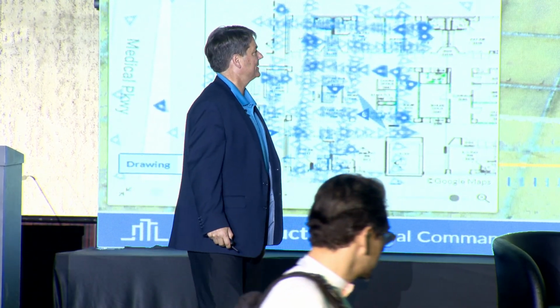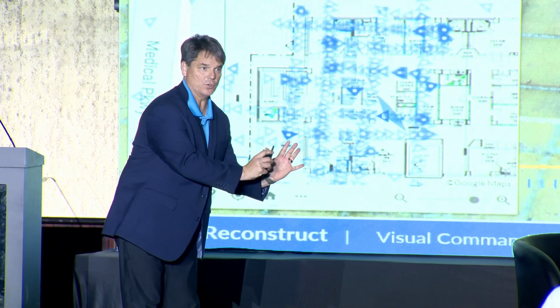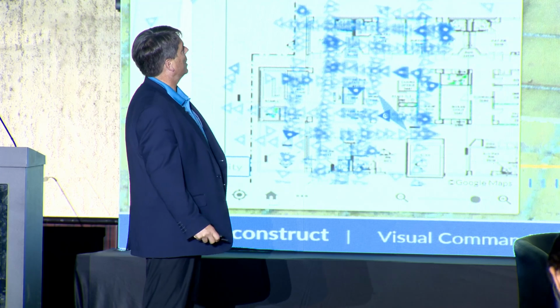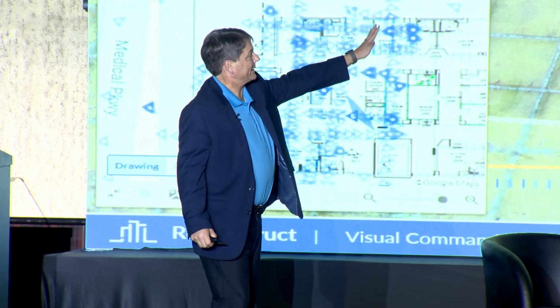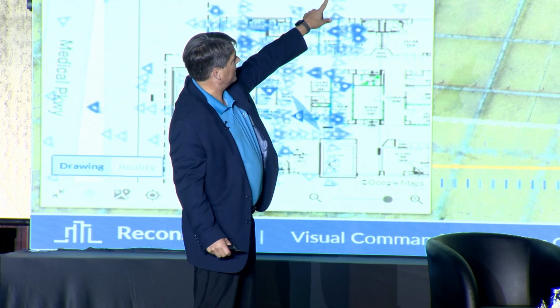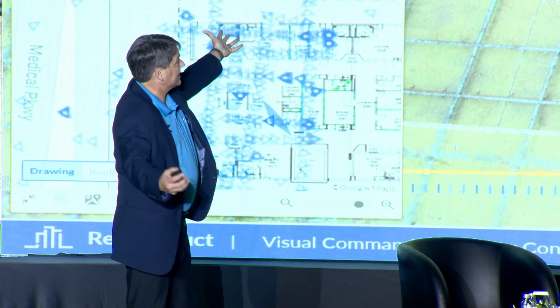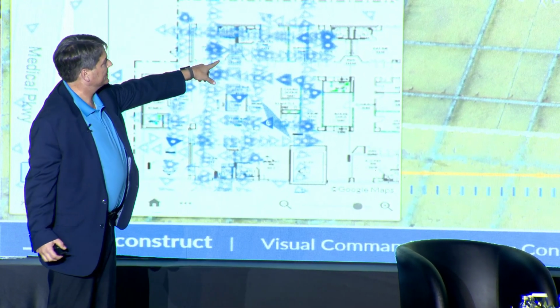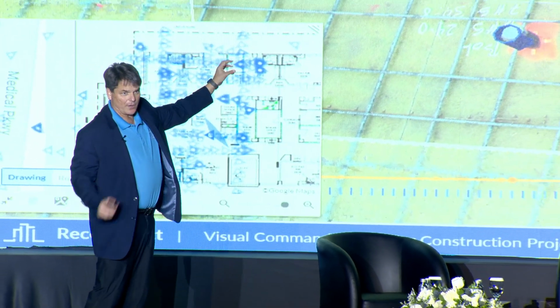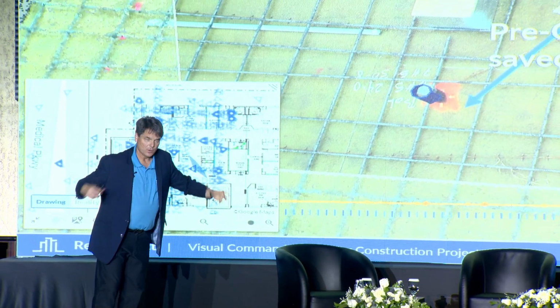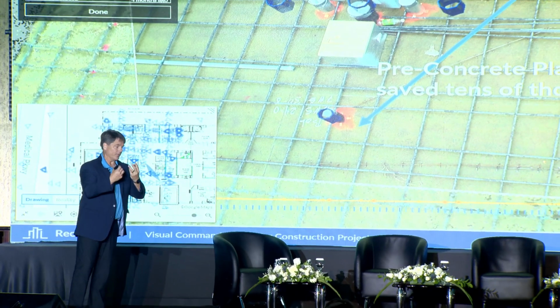This is a nice, simple example more in 3D. Now I'm escalating from 2D to 3D. Another pretty simple example is a pre-concrete tour, where I've got to make sure we get the sleeves in the right spot. Everyone see the blue octagons? The octagons that are properly in place are the gray circles where the sleeves are, where you bring the conduits up through the concrete.